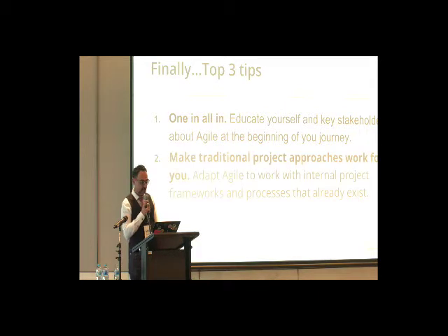The second one is, make traditional project approaches work for you. Adapt Agile to work with internal project frameworks and processes that already exist. Now, I know this is going to go against some of the Agile purists, and they may disagree with me, but you can work towards pure Agile if you want, it just takes baby steps to get there. Agile can still work in parallel with traditional project frameworks like PRINCE2, in some cases. Most of the project's processes can exist before and after the actual development. Then you can follow Agile for the development phase itself, and eventually, hopefully, it can be widely adopted as the approach for all of the projects within your organization.